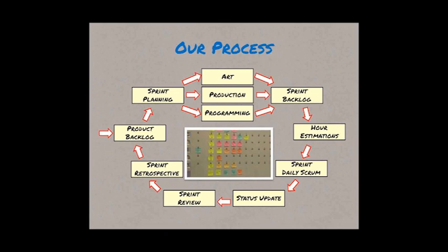And then, of course, we'd go back to our backlog, and any tasks that were remaining on the board, we put back in the backlog and reevaluated due to their importance. That did happen on several occasions, that tasks would be pushed back even further because they just weren't that necessary to get a presentable product for the next status update, and we'd start the cycle over again.